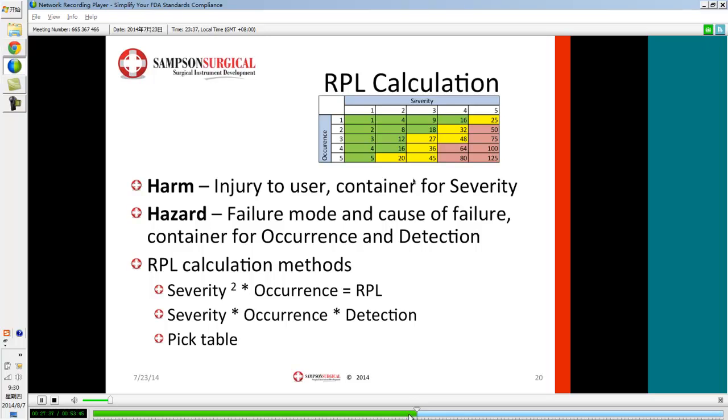This goes to the discussion before: if you start bleeding definitions over into each other, it becomes impossible to define what the occurrence and detection is if half the definition of the hazard is someplace else, not actually in the harm. I've had a variety of people suggest a work item called a cause that links into the hazard, which is fine, but you have to have the cause along with the failure mode to determine the occurrence. So you have to think in terms of a database: where are the numerical values going to reside? If you can do that, then you have a self-contained work item.